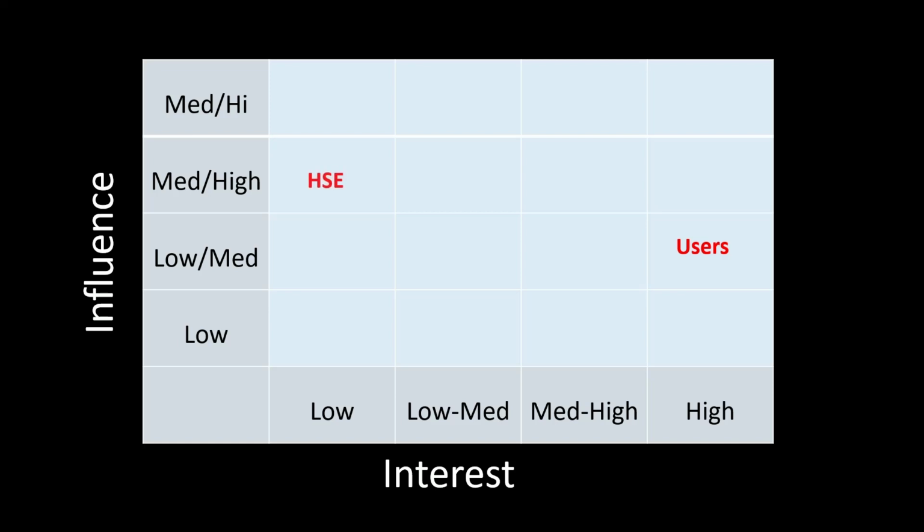So this is clearly a legal compliance organisation who, generally speaking, are not interested in your project. Okay, so you'll notice their interest is very low. They don't really care about your project unless something goes wrong. And if something goes wrong, actually, they do have a high, depending on your project it might be extremely high, ability to influence your project, either the way your project is run itself or the way that the deliverables operate at the end of the day.